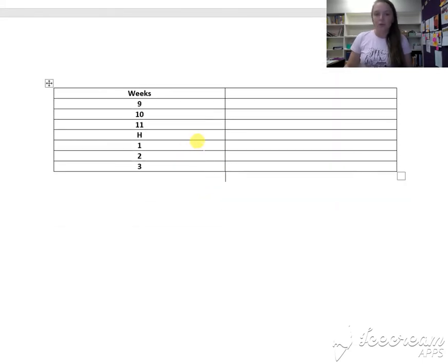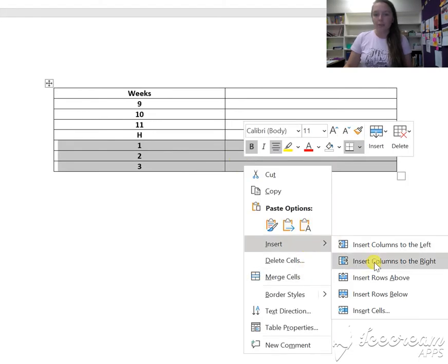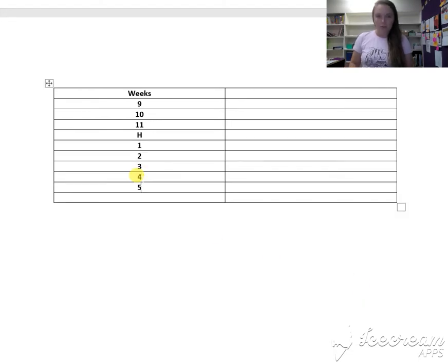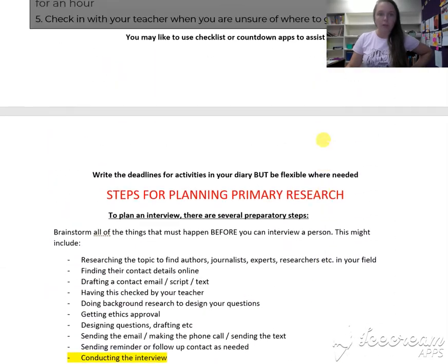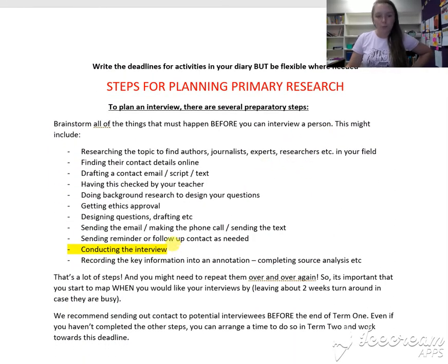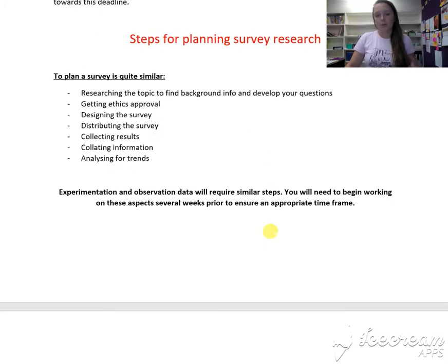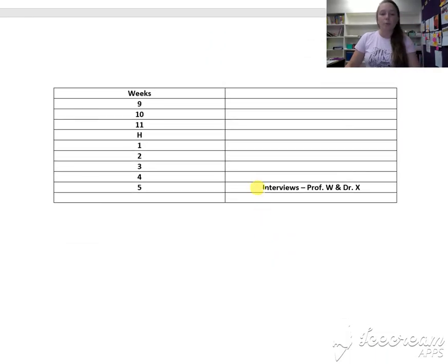So if you know that in week 5 you would like to be doing your interviews, okay, 5 interviews, and you know from your research that you've done so far that you're going to do interviews with Professor W and Dr. X. Okay, that's what's going to happen for you in week 5. So let's flick back up here and we'll have a look at all the things we have to do first. So before we can do the interview, we need to send a reminder. Okay, so when are we going to send a reminder to these people? Well, I'd probably send it in the start of week 4.